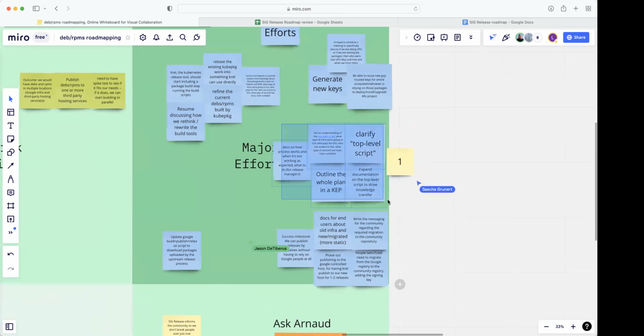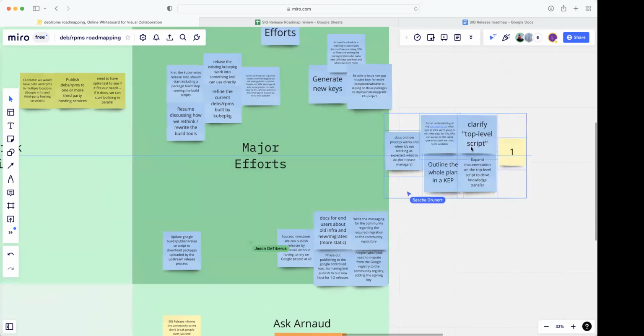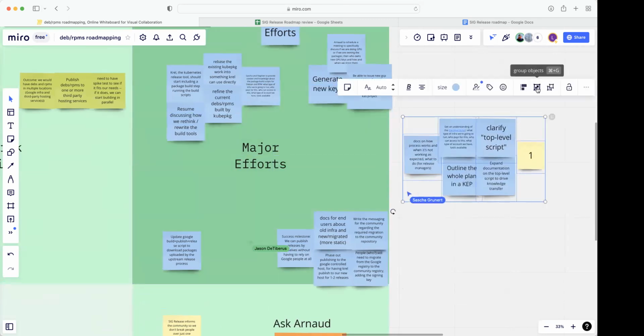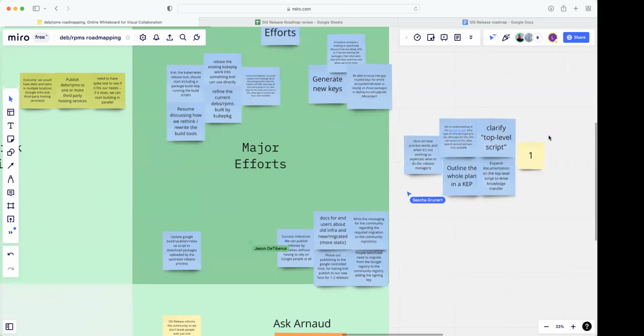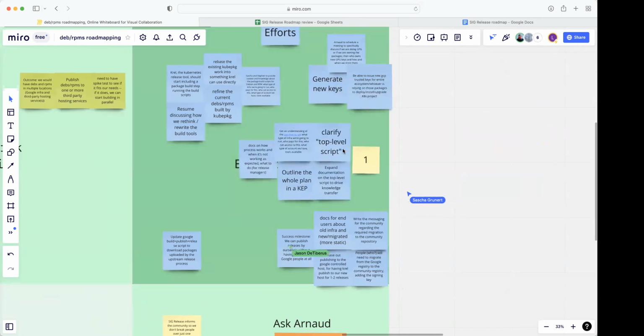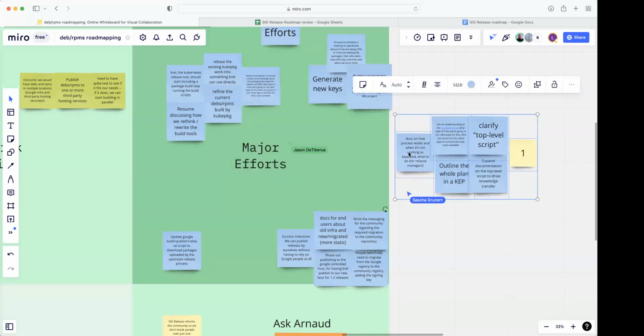These docs on how the process works, this is something that actually comes after. Because if we are talking about writing docs in the sense of how we debug everything when something goes wrong and so on, this depends on everything else being finished. Hmm. That's a good point.